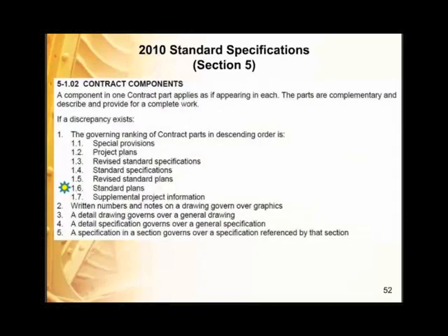Okay, for the 2010 standard specifications, in section 5, we changed the hierarchy or the ranking of the different parts. So if you notice where the little star is, standard plans are now in a lower ranking than the standard specifications. So that did change, and we had to go through and make sure that if we had standard plans that were relying on hierarchy, we wrote our specifications correctly so that the standard specifications wouldn't accidentally override our standard plans. That ranking was changed. That's something you really need to note.